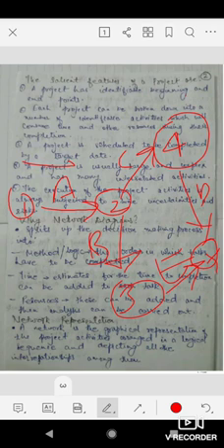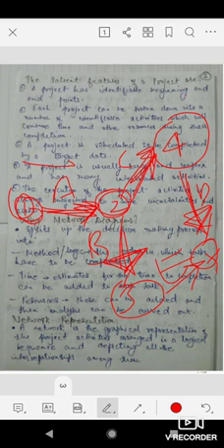In this network diagram, the arrows represent activities. As I have told you earlier, like foundation making, construction of a pillar, and then ceilings, we can have different activities in construction of a building. These points 1 and 2 represent the events: this represents the initiation of the activity, and this gives us the finish or completion of that activity.